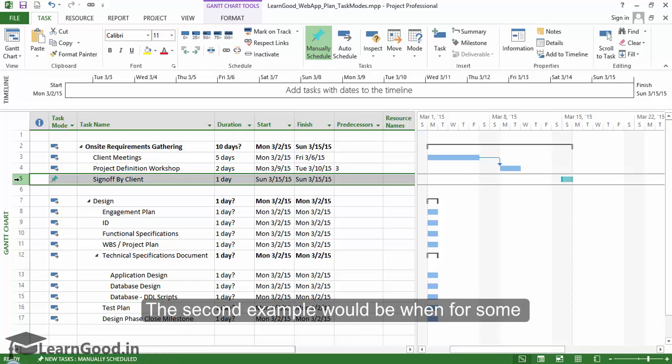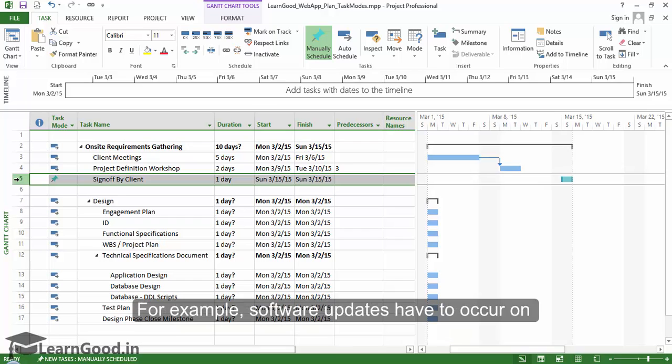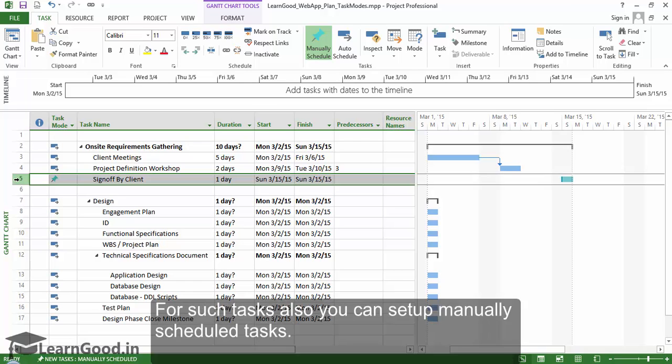The second example would be when, for some reason or other, a task should be scheduled on a very specific date. For example, software updates have to occur on midnight of last day of every month. For such tasks also you can set up manually scheduled tasks.